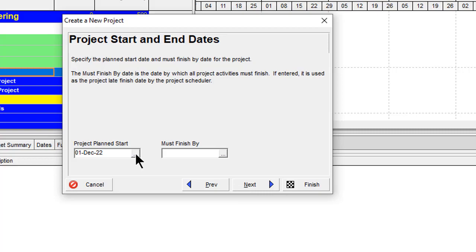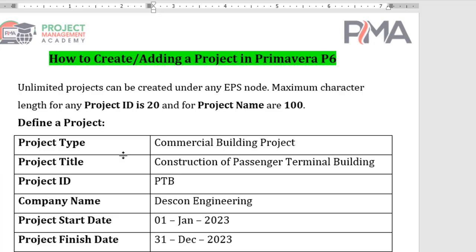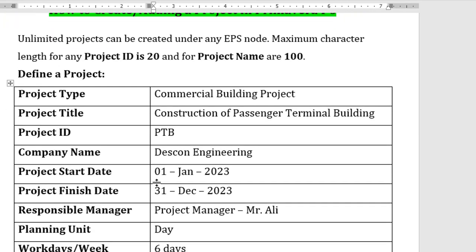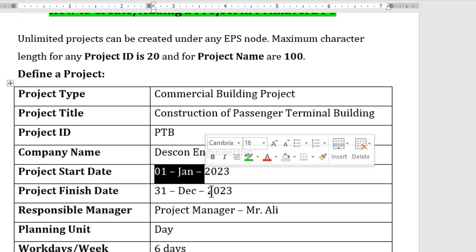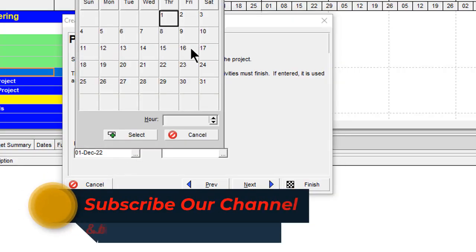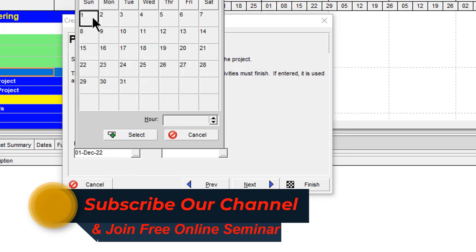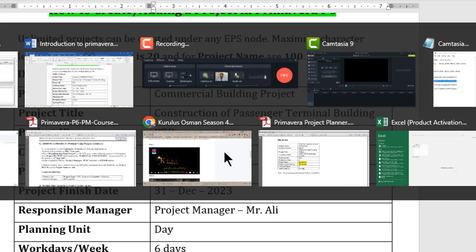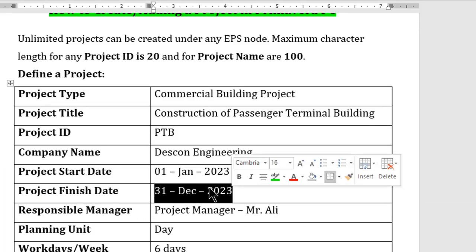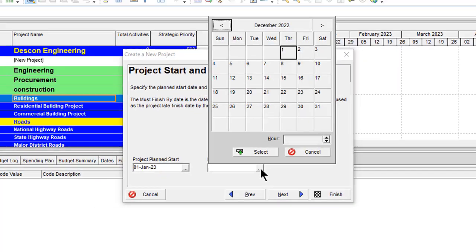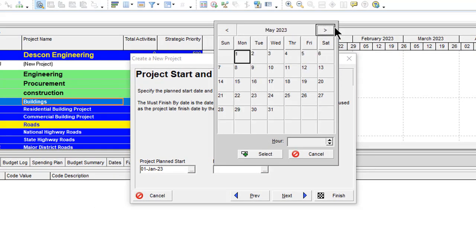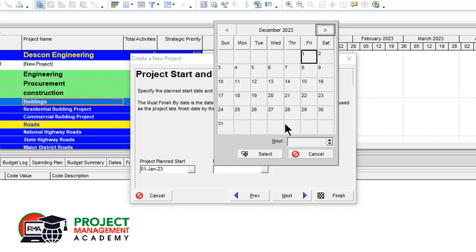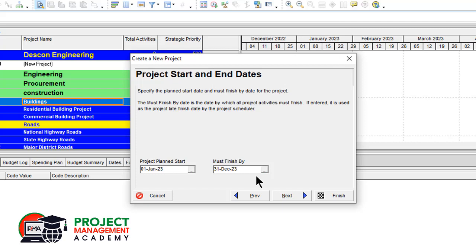Next is the project start date. The project must start from 1st June 2023 — click on the search button and navigate to that date. The 'Must Finish By' date should be 31st December 2023 — select it from the calendar. Then click Next.